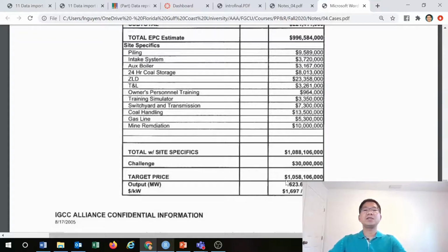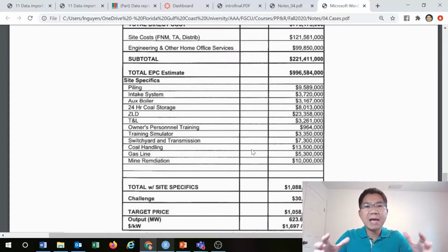And as you can see, relating to lesson 3 we learned, in this case the output or capacity is in megawatts. So this one is about to produce about 630 megawatts. In wastewater treatment or water treatment, we're talking about a million gallons per day, etc. So that's the way that they apply it. And sometimes we use multiple methods to come up with the estimate, depending on the information we have at that point.